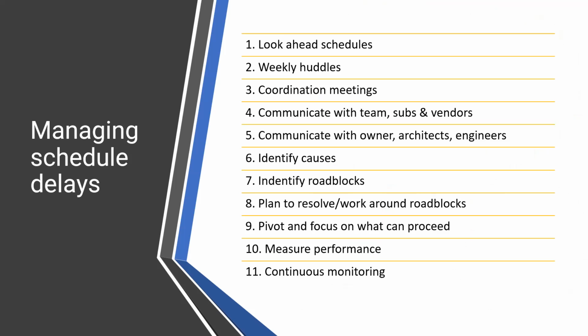Sticky notes on site is ideal, either on the screen with the little projectors that we bought, or the old fashioned way with sticky notes. Having weekly huddles, but also daily huddles with the people on the job site, means that as things come up, you can adjust that pull schedule.